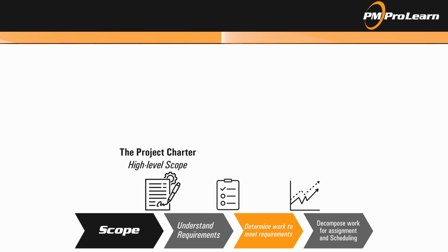Therefore, the project charter provides the high-level scope, the scope management plan guides the team on implementing that scope, and the scope baseline details the complete deliverable for execution. Finally, our decision to approach the project influences how we manage scope.